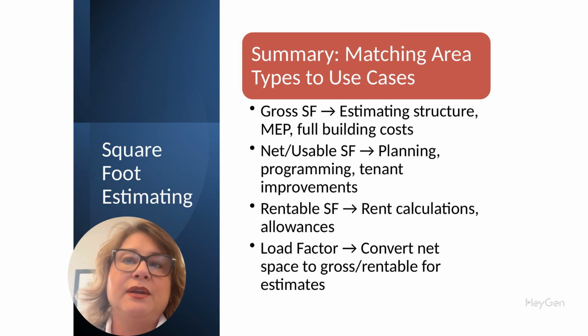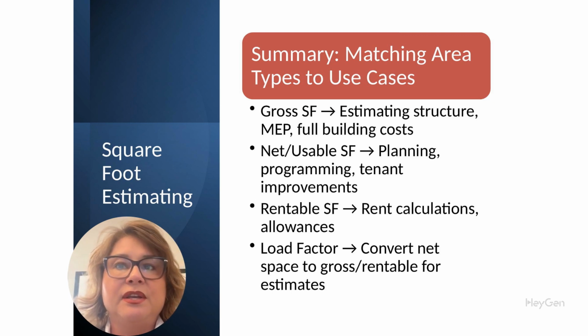4. Load factor. Use the load factor to convert usable area to rentable or gross, especially when a program is in NSF but the building needs to be priced or sized using GSF or RSF. If the program says 40,000 usable square feet and your building has a load factor of 1.25, then you know the total rentable space is 50,000 square feet, and that's what you'll design and price.